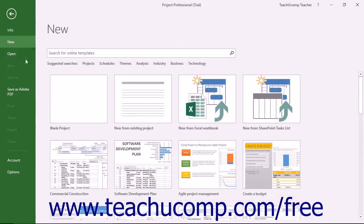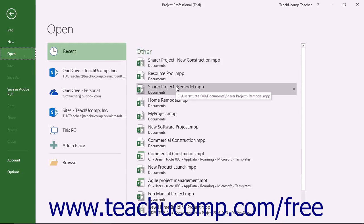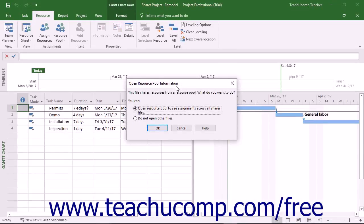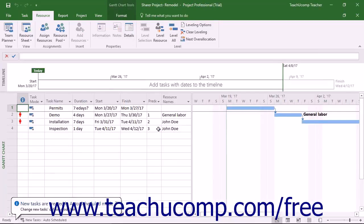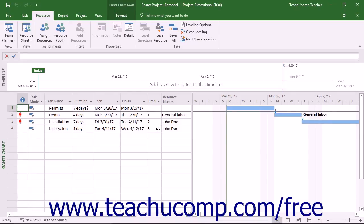When you initially open a sharer project file, the Open Resource Pool Information dialog box appears. In this dialog box, you can select the 'Open Resource Pool to see assignments across all sharer files' option to enable all current assignment changes to the shared resources to appear within your sharer project file. This also opens the current pool file as a read-only copy in the background. You can then make the task assignment changes as needed.